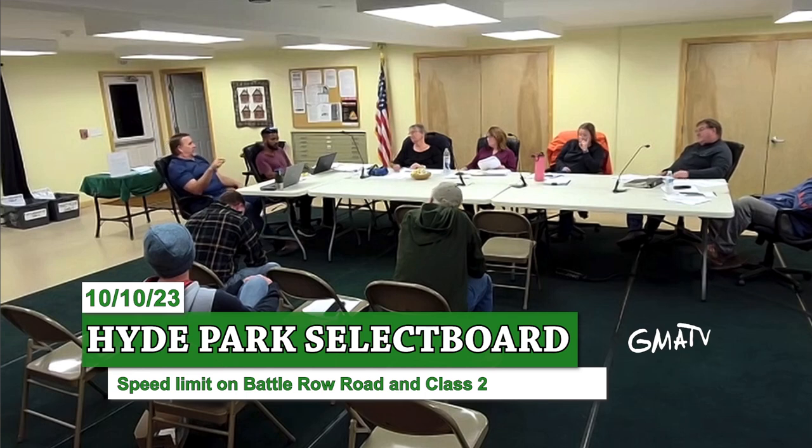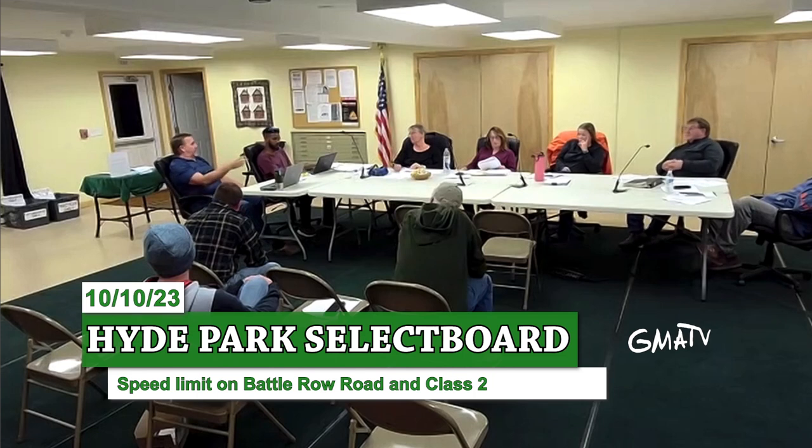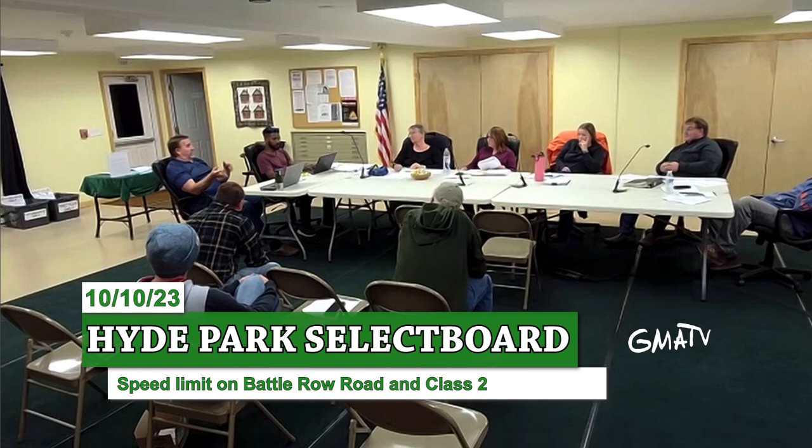If there's a way to do it on these dead end roads that doesn't include the speed study, like the 85th percentile, then maybe that's how we accelerate these other roads. The class two roads, your through roads, I definitely do have a full study on that. But some of the side roads that are dead ends, or Sterling View or Maury Road, I think we could get away with a modified traffic study on those and get that documented, and why we did it, to accelerate this.